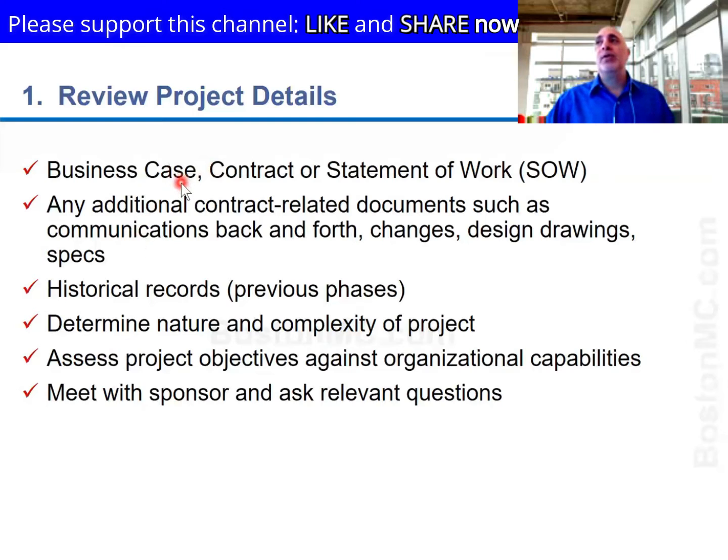All right. So the business case would have already been done, or it could just be a statement of work. It's a scope of work. They just tell you the scope, what they need, and then you will go and get additional details. For contractors, their project starts whenever a contract is signed. So these are the three typical ways a project comes in.